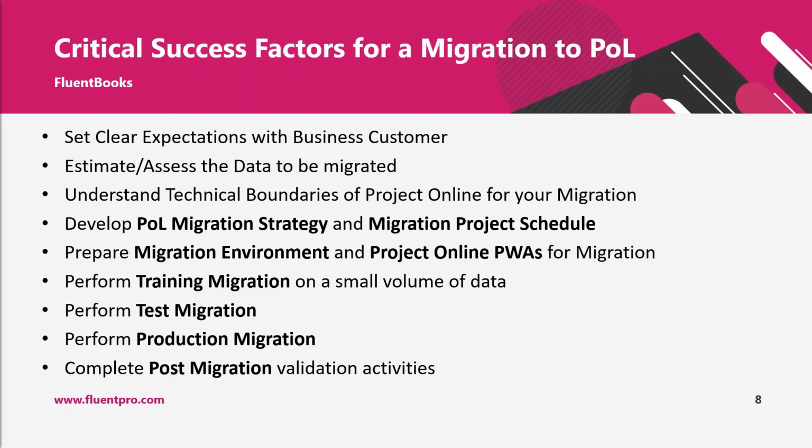Before migration to Project Online starts, the Project Online environment itself would need to be prepared for migration. Project Online PWAs would need to be provisioned. Site collection space would need to be allocated. Users who would need to have access to the Project Online environment would need to be created on the tenant level with their new accounts. And other factors are related to the process of migration itself.